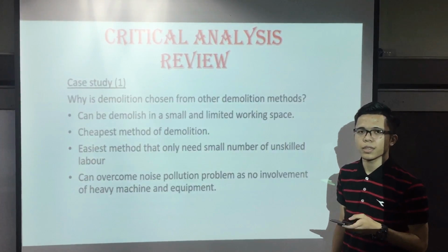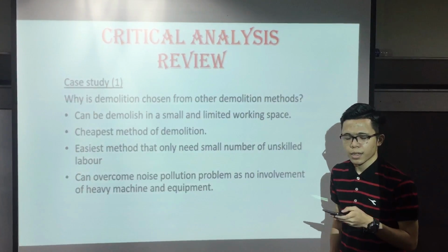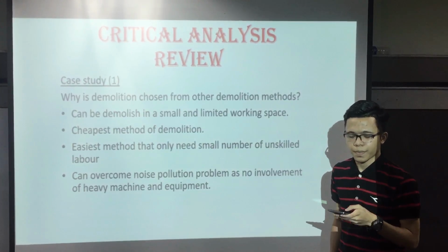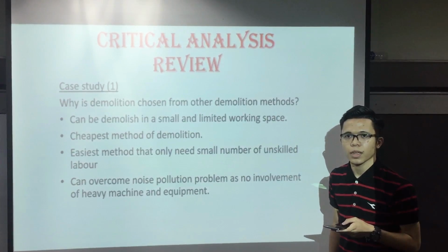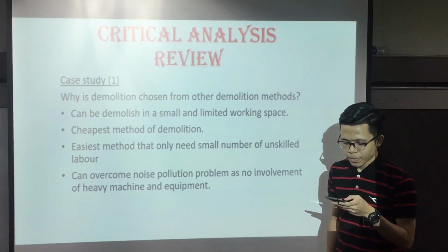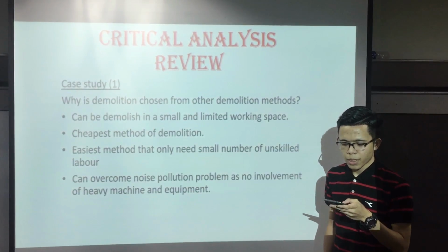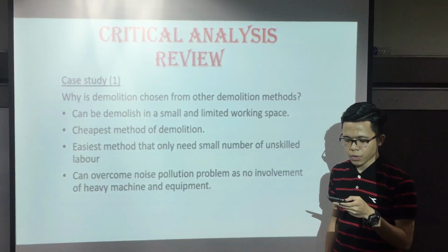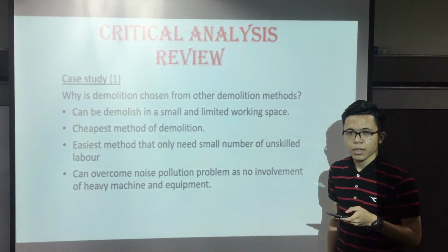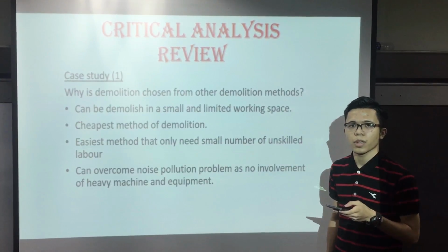As stated in the background of the project, the building is located in a residential area with high population, and the distance between the neighbors is very close. Hence, hand demolition is the most suitable method, as it can work in small and limited working space.